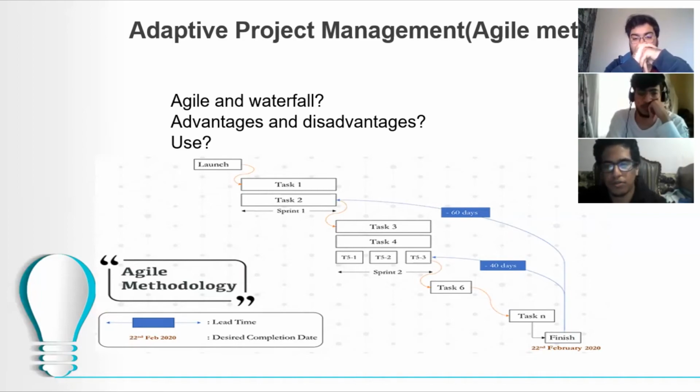As opposed to waterfall, Agile, as the name suggests, is more of an iterative approach. A project is divided into sprints or smaller chunks, and collaborative teams are divided to work on the sprints separately. At the end of the sprint, they come together to discuss their progress and to work out issues collaboratively. Testing is also carried out at the end of each sprint, rather than at the end of the project, to ensure bugs are fixed right away.